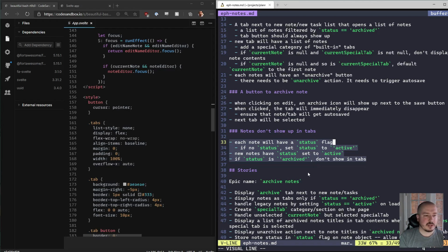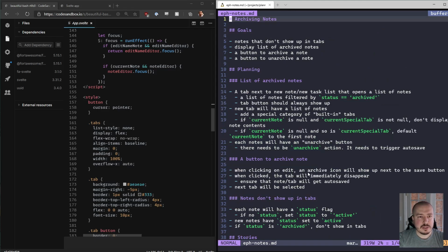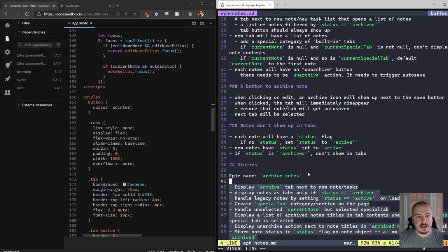So I find it really important and interesting to plan out features. I would say anything that takes more than a couple days should have a certain amount of planning going into it. I've been doing this for years, and it's pretty easy to look at these stories and point them. I would say every single story should be 1 point, unless there's an unknown, like, hey, we need to research this. Okay, then give it 2-3 points, whatever. But generally speaking, I always assume that 1 point is what a developer can do in a single day.